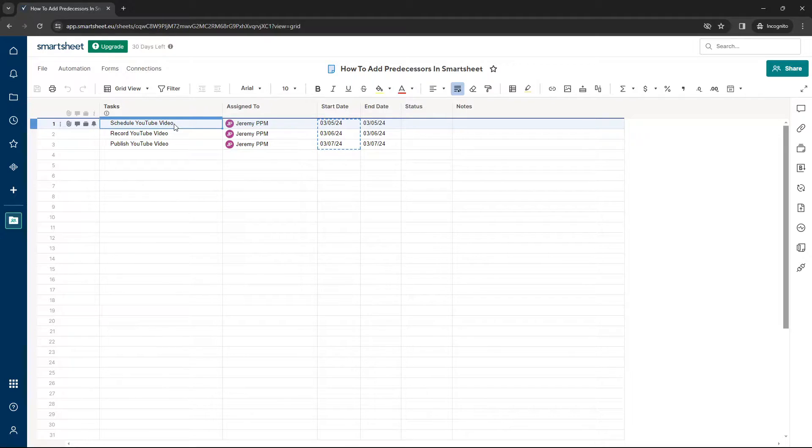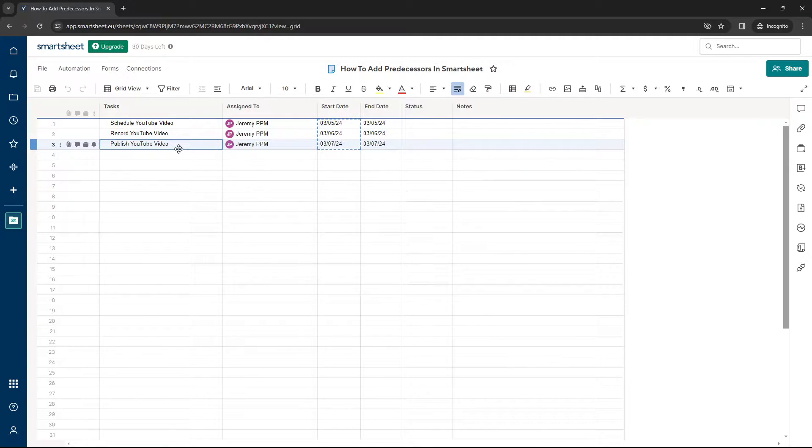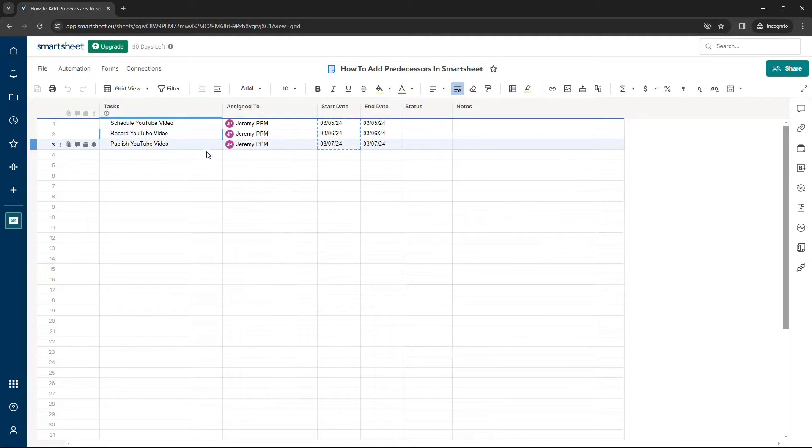So as you'll see here, we've got the schedule, we're scheduling the YouTube video, we're recording it and we're publishing. So naturally, these are reliant on one another. We can't publish a YouTube video until it's been recorded. So we need some predecessors.